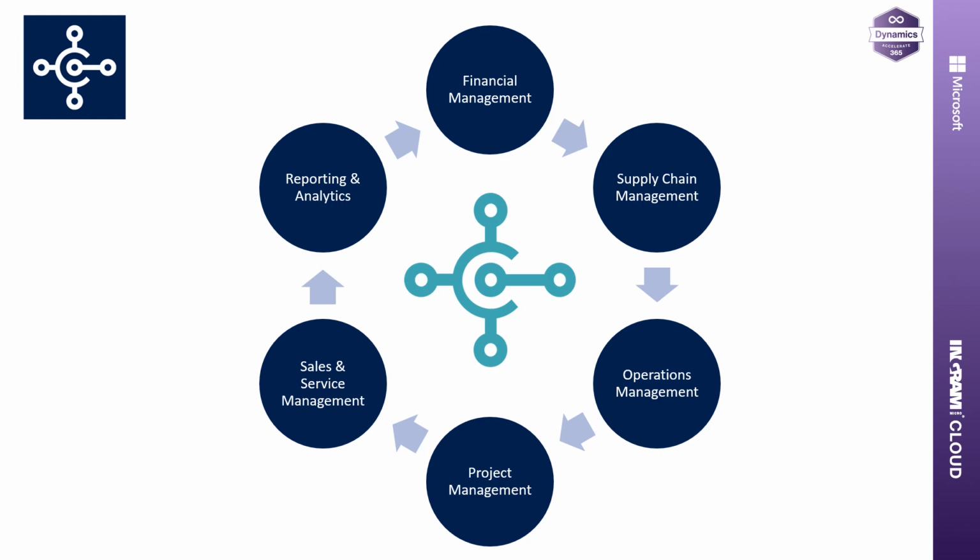Pushing that through towards project management, this is typically targeting organizations where you're engaging with a customer in a project, and that might be for the supply of professional services, and it could be services along with a mix of product. So the jobs module in Business Central takes that project management approach based on a template for a work breakdown structure, and you can take a template from a previous job and learn from that and use it as the starting point for your new project, so we can capture best practice without having to reinvent the wheel or start from a blank piece of paper all of the time.